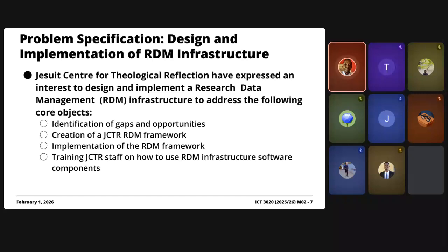And it's quite common when you're developing software on behalf of an entity for you to train them on how to use the piece of software that has been developed. It's usually included as a very important task done after you deploy the software. So when you're costing, you take into account the cost associated with training. Okay.